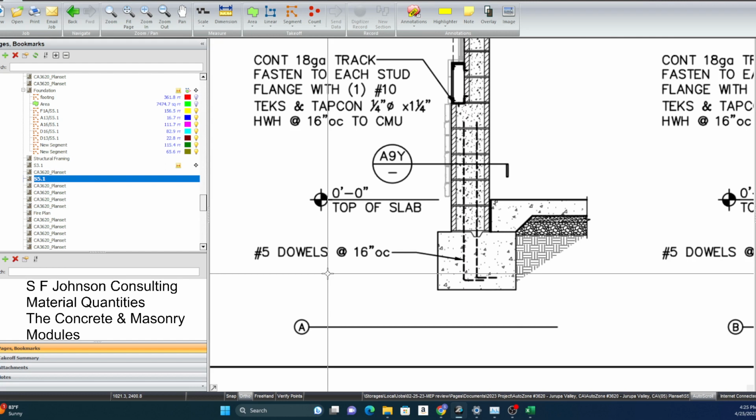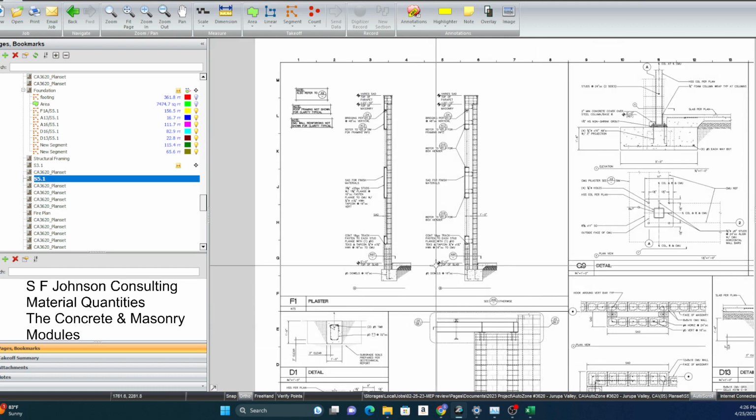So we change 157 feet into inches, divide by 16, and that's how often you'd have to place those number 5 dowels. That's how many placements, and it looks like it's 2 of them together. Okay, so that's pretty much how you do that.